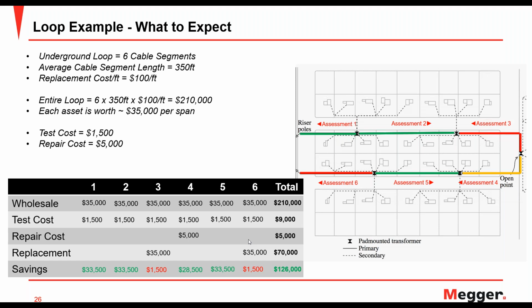So this is what we're talking about in terms of the economics. But think about everything else that we've also done here. We're actually doing more with less. So, project management: there's efficiency here. You're only replacing 2 cables and repairing 1, whereas a wholesale replacement approach would have required replacing all 6 cables. So there's project management. You're going to finish a project quicker, 2.5 times quicker.